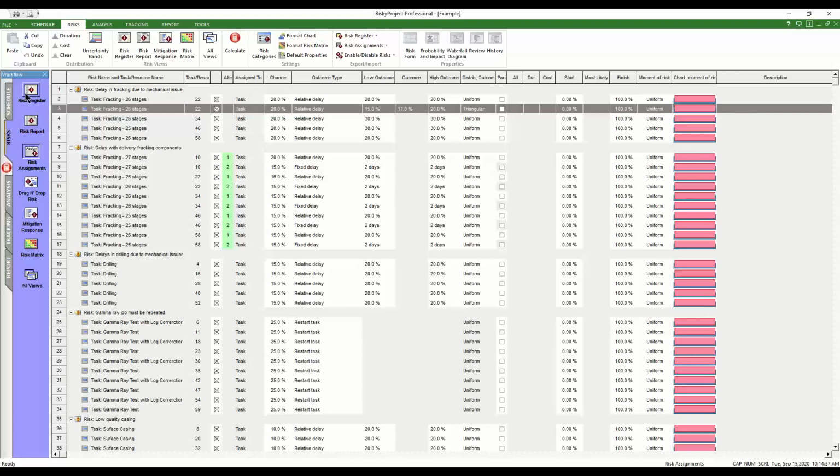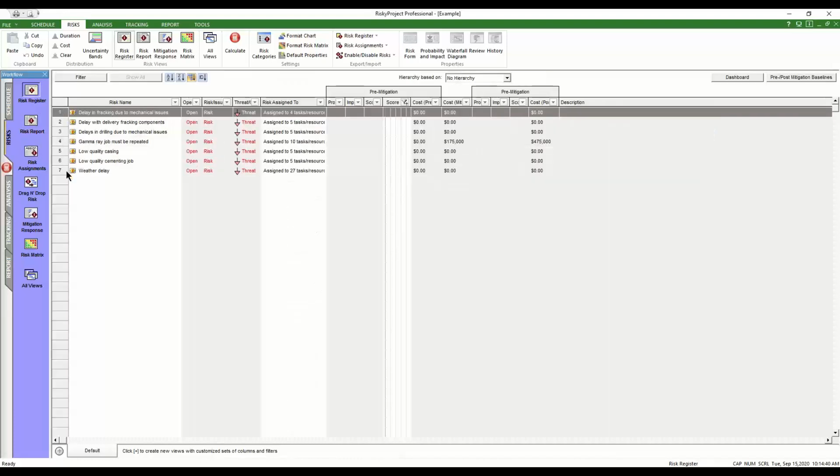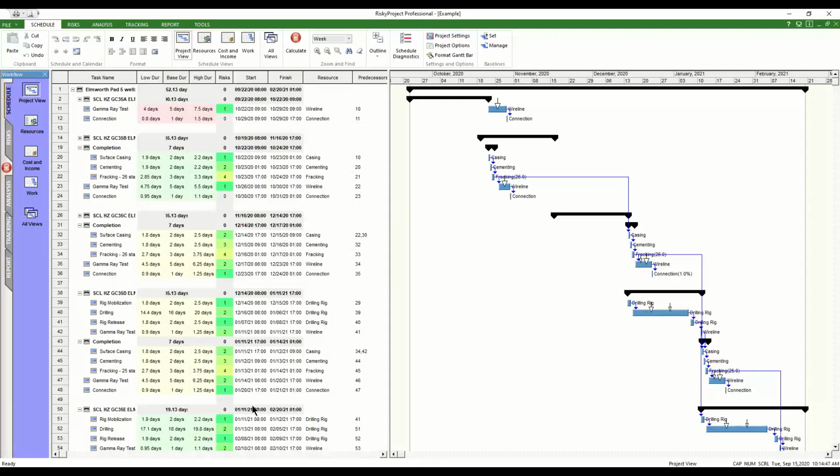So we've set up within the system our risks, and these represent manageable or reducible risks in the system, and we've set up 3-point estimates, which are a separate bucket to manage unmanageable risk. This type of risk that we see here is going to occur, it's 100%. We can't change the probability of it occurring, so all we can do is account for it.